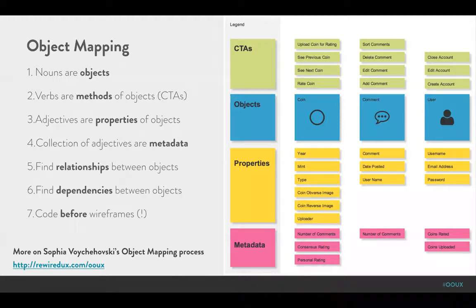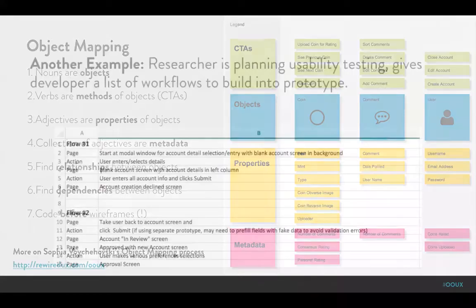Well, if we did this on the first day, on Monday morning, where we had the designer and the developer sit down and just map this out, then instead of having one week followed by a second week, you can have two parallel development efforts going at the same time. So you're looking at a very big possible increase in speed of development there.